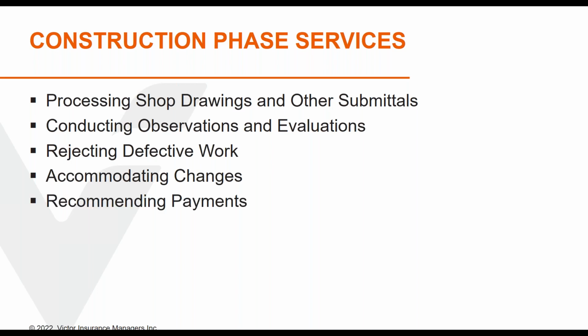And then finally, recommending payments, percent completes, processing pay applications. Determining how much of the work has been completed is essential to successfully manage any construction project. The owner oftentimes has taken out a loan, and the banks certainly want to make sure that what is being paid for has actually been put in place.